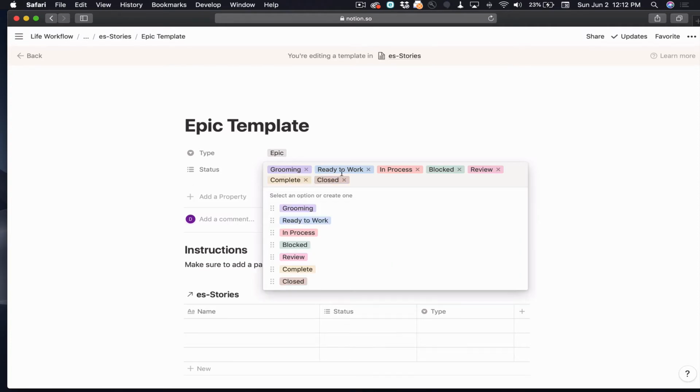All right, so I want to have a process in here where in the course of the sprint, we should be completing tickets, but then once they're completed, I want to do a cleanup action where we actually go through and close the tickets. And by closing the tickets, we're going to remove who the ticket was assigned to, so that way when we're doing utilization, we're not getting hours coming from tickets that are actually not in the current sprint.